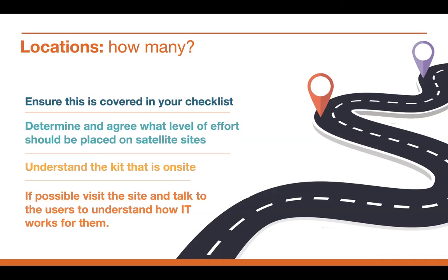Every time the chairlift, the ski lift, it was a dry ski slope, would go on, it would disrupt the wireless signal. So you can imagine how many calls that generated on the service desk. We were sending engineers back and forth, only to find out that this portacabin is only occupied limited times during the day. So was it really worth the effort? Had we done our research, we would have known about that. So that's something that you need to determine from the get-go.